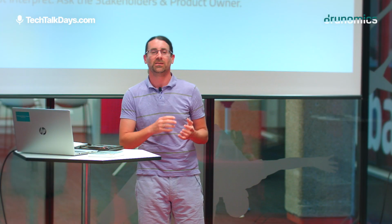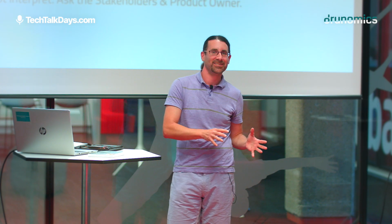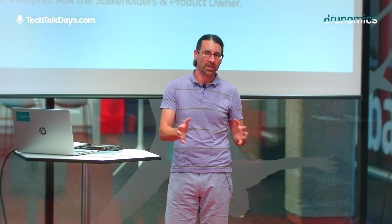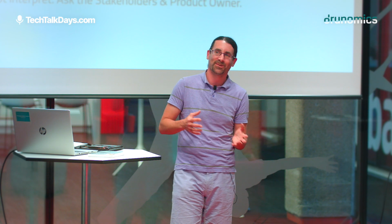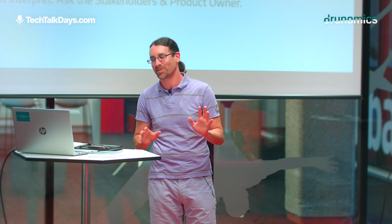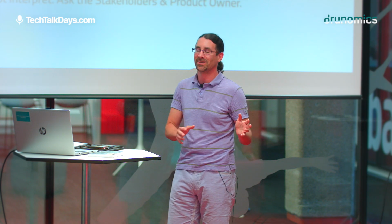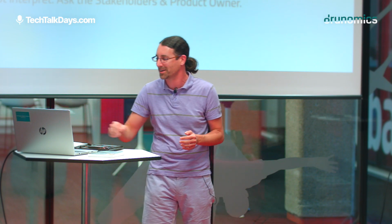One other thing that comes up constantly is being able to interpret what the stakeholder wants. Sometimes that's a good idea because the stakeholder really has a problem describing what they want, and you really, from your practice, you know this, you know what they want. But if there's any doubt, phrase it how you think it should be phrased, phrase the user story, and then go back to the stakeholder and get their approval before you actually start to develop, because otherwise you might be developing in a completely wrong direction. For something small, it doesn't matter, but for something large, obviously, you don't want to be at the other end, at the end of the day, where somebody says, well, actually, what have you developed for 2 weeks? And it's a bad thing.